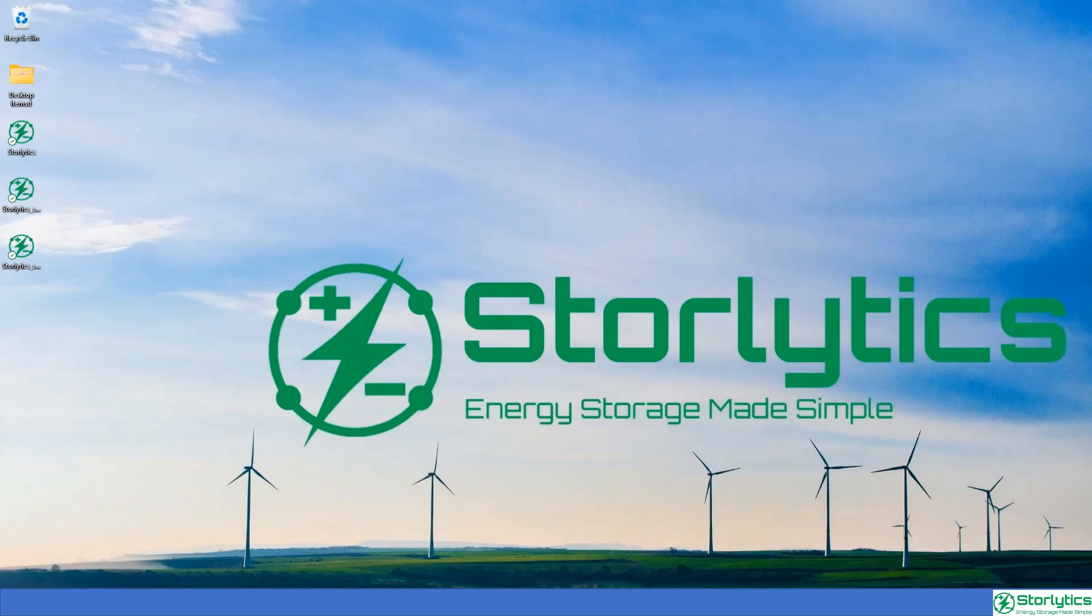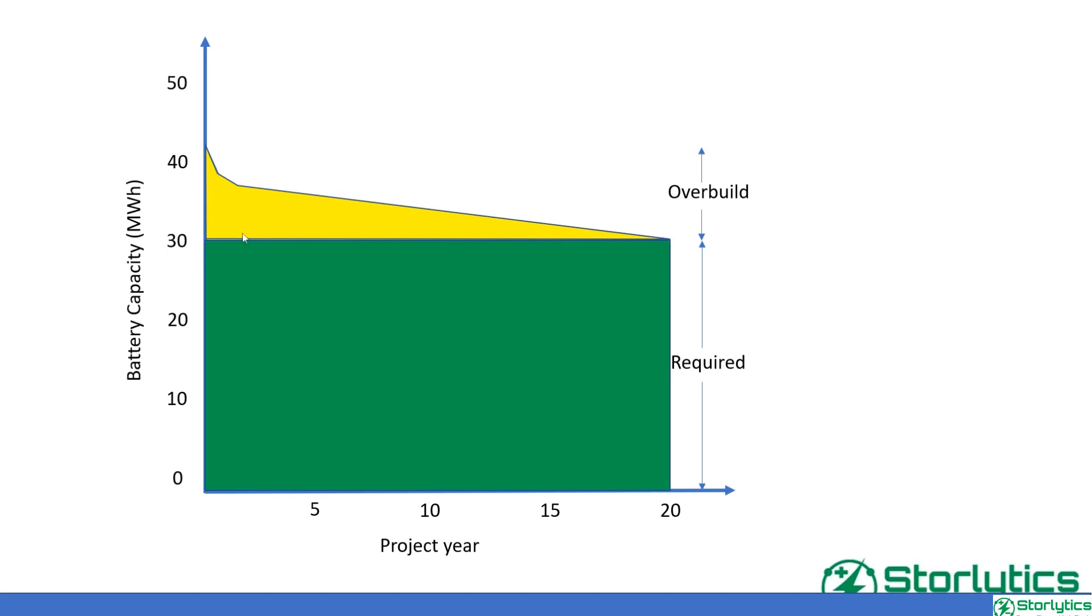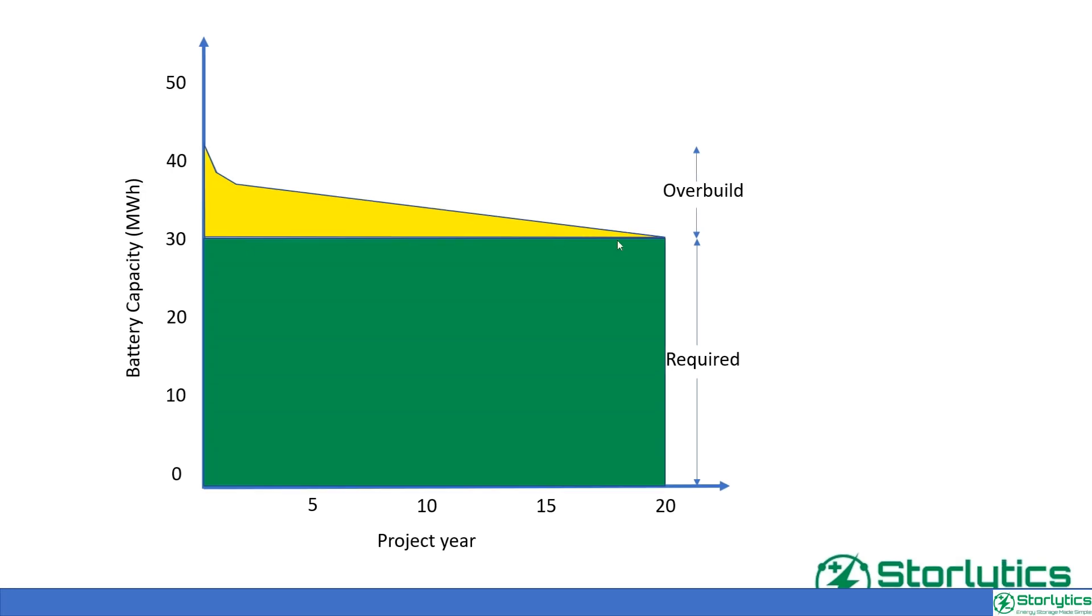The most conventional method of accounting for degradation is simply oversizing the battery to deliver the intended amount of energy till the end of life. While this is a good and straightforward solution, it fails to consider potential cost reduction of battery energy storage, improving technology, and its impact on degradation and energy density. Augmentation, on the other hand, can be used to maintain capacity or performance at a specific level by the end of the project.